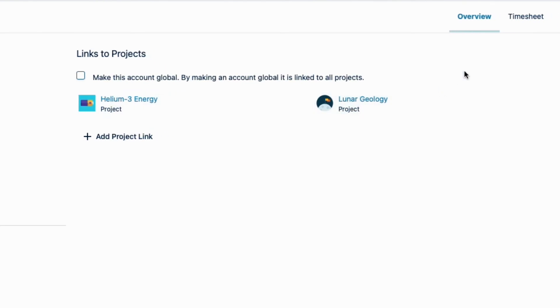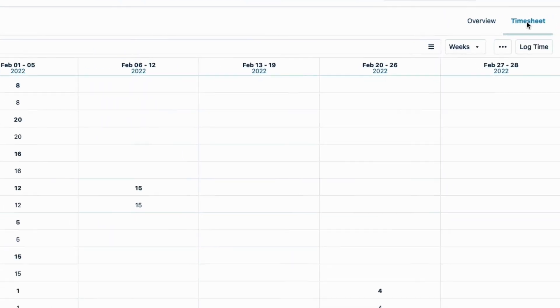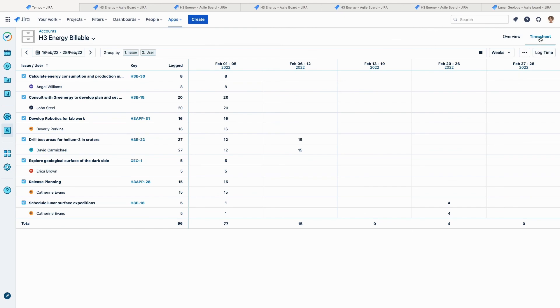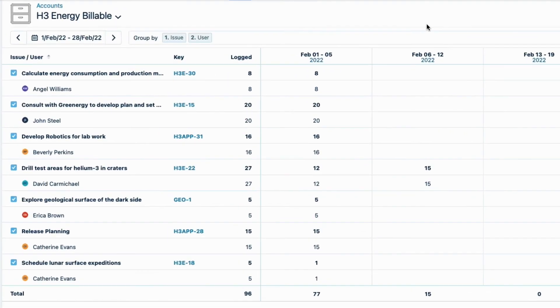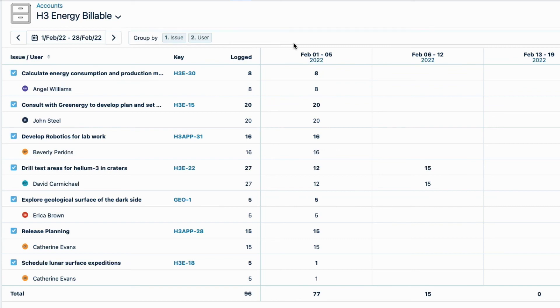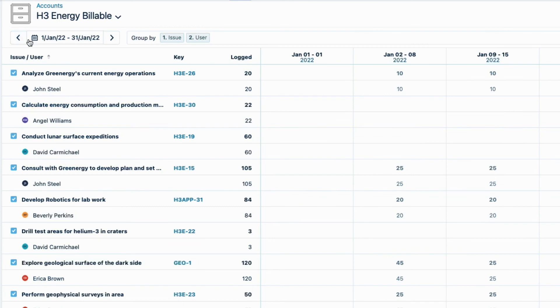Then I'll click Timesheet up here on the right. And here I see all the time logged to this account. This is handy for doing a quick check on the billable hours worked on, by whom, and on which issue. I'll check the previous month because that's what I'll be running my report on for invoicing.